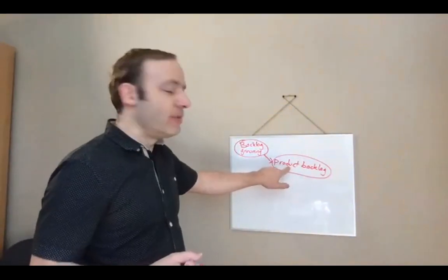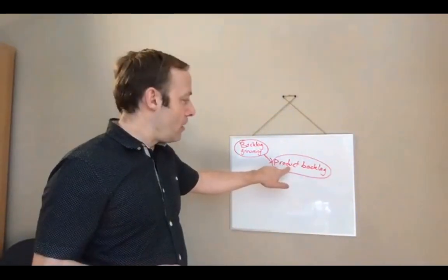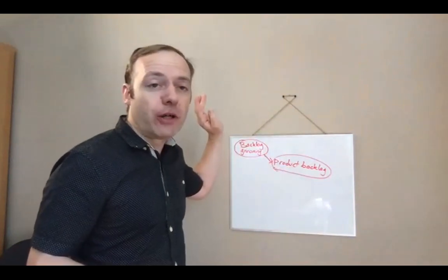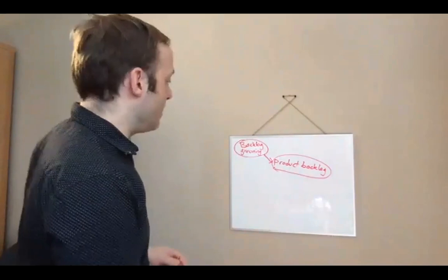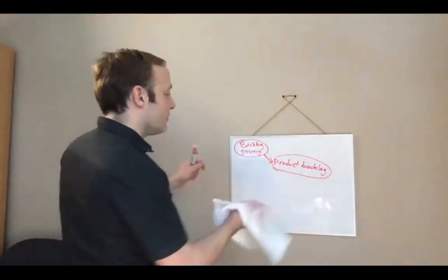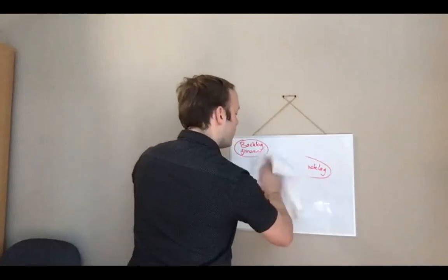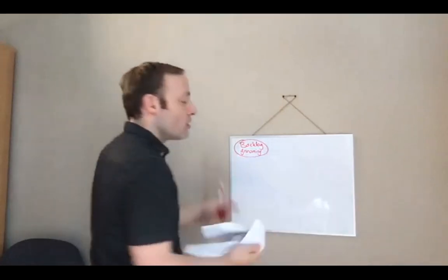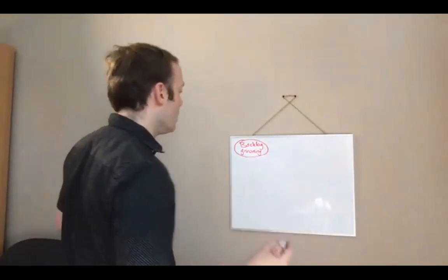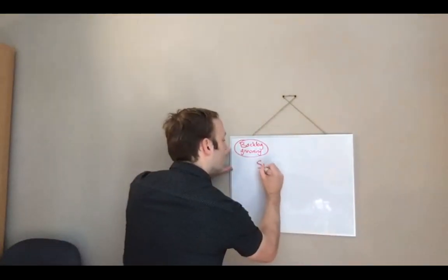With Kanban, developers are just allowed to start working on the item as soon as it's in the to-do list. But with Scrum, it's slightly more complex. With Scrum, we estimate how much we can do during a sprint. So your sprint can be 1 week, 2 weeks, or 4 weeks typically. So you do the sprint planning.